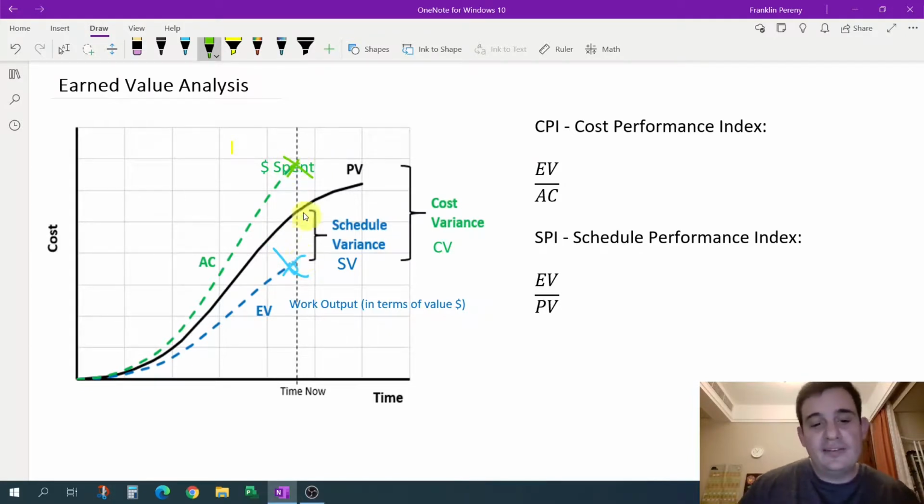And the reason that it's earned value divided by actual cost is, if you think about it, if you estimated $1,000 per mile, and you've actually spent $3,000, and you only got half a mile done, that's like $6,000 per mile, right? That's why you want to compare these two in a ratio. It's basically a way to normalize what's your actual cost ratio compared with what your plan was.